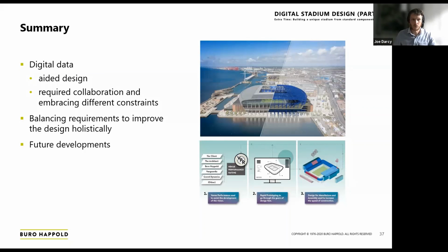I think one of the main drivers for using DFMA is program on site and limiting that as much as possible. We've almost digitally created what will be there on site, and so can understand how that can come together much better. It's a dry run of how it will be constructed.